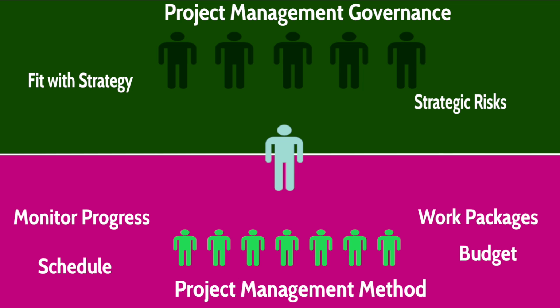Now, it can be quite convenient to actually split your role into two. And that involves appointing a project sponsor. So the project sponsor takes the main role in reporting up the governance route, leaving the project manager free to manage the execution of the project on a day-to-day basis.